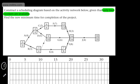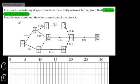So we're going to have Worker 1 and Worker 2. The difference between this and the last example is that we don't use a Cascade or Gantt chart to draw the scheduling chart — we use the activity network. That's because of the dependencies, and we have to be very careful when allocating activities to each worker as we must meet all of these dependencies. The basic guideline is: if a worker is ready to take an activity, we allocate it to them; if we have a choice of two, we give them the most critical — that is, the one with the lower late event time.